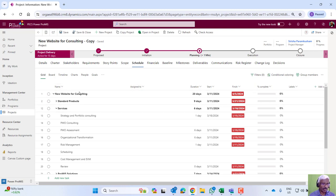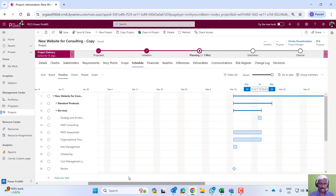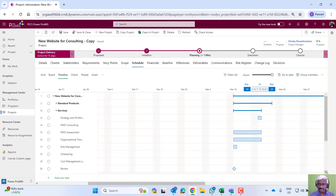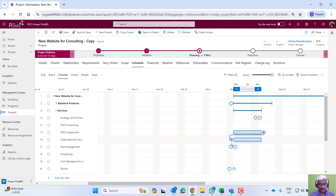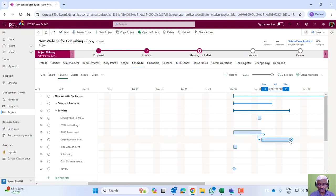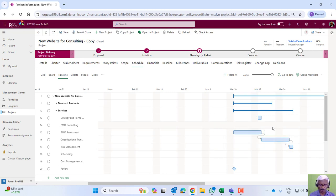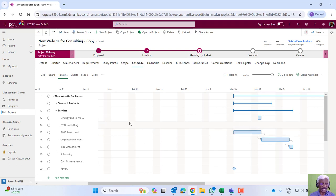If we want to take it to a timeline view like a Gantt view, we can define activities and then define relationships. Accordingly, the dates will get adjusted, and you can develop a full-fledged project schedule and then identify critical path, all those things.